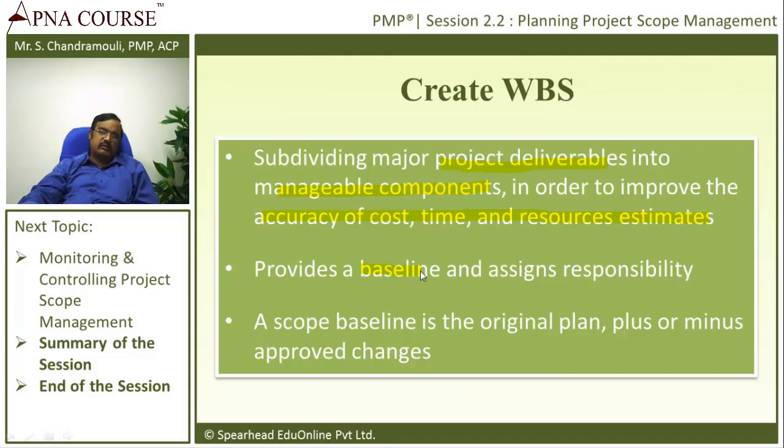If you remember a few slides before, when I talked about baseline, we talked about the Create WBS. So Create WBS creates which baseline? We're talking about scope management, right? So the Create WBS process, the output is the scope baseline. So it's not just the WBS, it actually creates the scope baseline and assigns a responsibility.